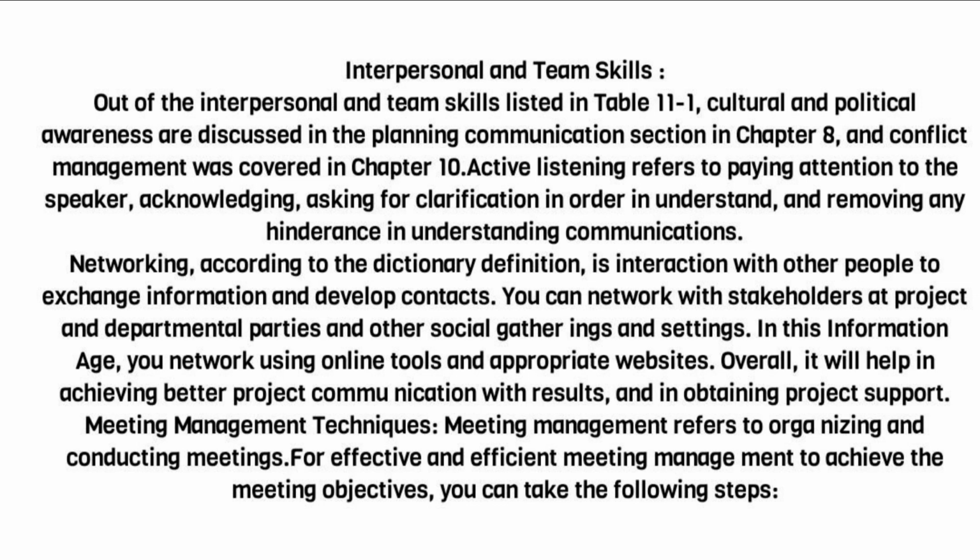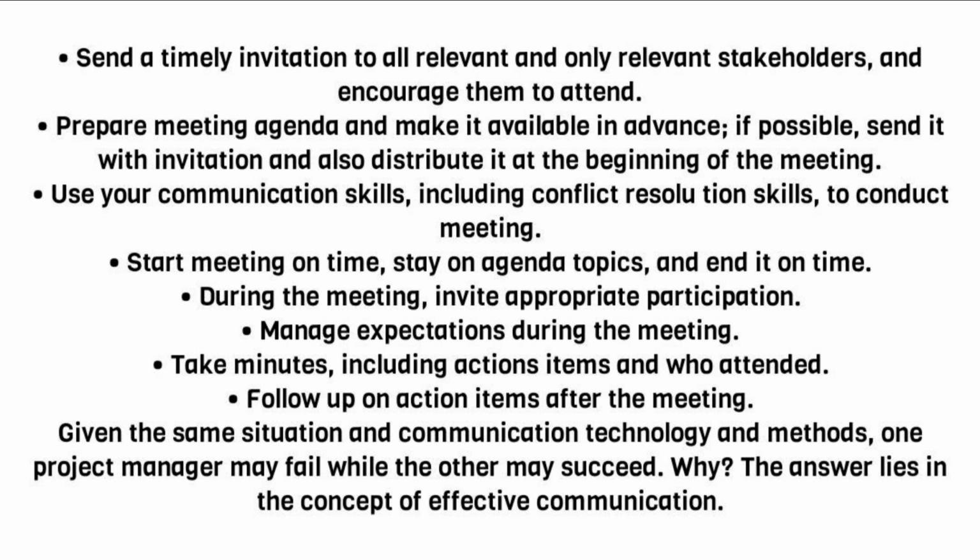Meeting management techniques. Meeting management refers to organizing and conducting meetings. For effective and efficient meeting management to achieve the meeting objectives, you can take the following steps. Send a timely invitation to all relevant and only relevant stakeholders, and encourage them to attend. Prepare a meeting agenda and make it available in advance, if possible. Send it with the invitation and also distribute it at the beginning of the meeting. Use your communication skills, including conflict resolution skills, to conduct the meeting. Start the meeting on time, stay on agenda topics, and end it on time.